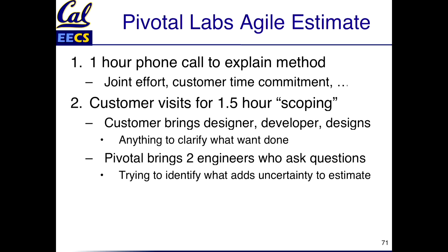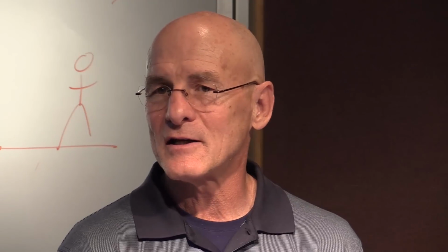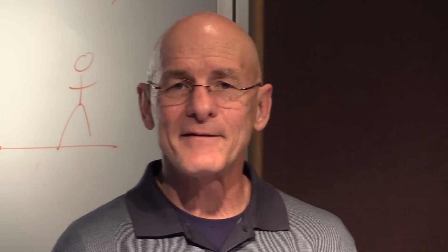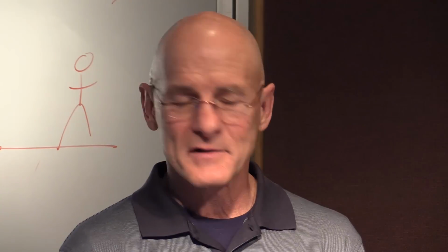Then they have this hour-and-a-half session that's called a scoping session. The customer has to bring everybody associated with the project who has some idea about the design, whatever design documents they have, developers and designers, anything that can clarify what has to be done. And Pivotal brings 2 of their engineers, and they ask these questions, trying to identify whether there's anything about the project that's going to be risky in terms of the schedule, and try and work that out. As soon as the customer leaves, the engineers spend a half an hour to try and make a guess of how long this is going to take.